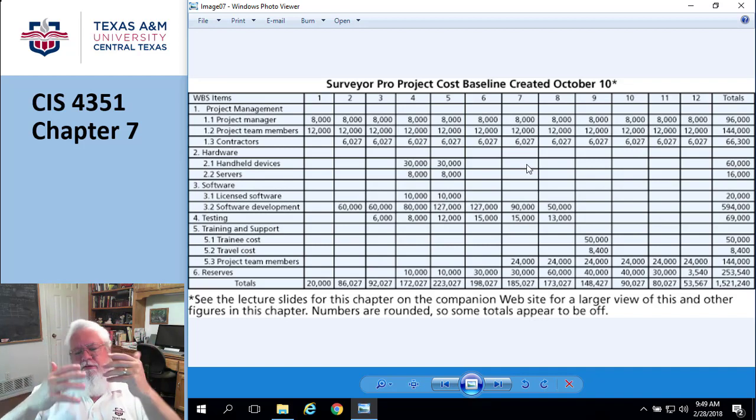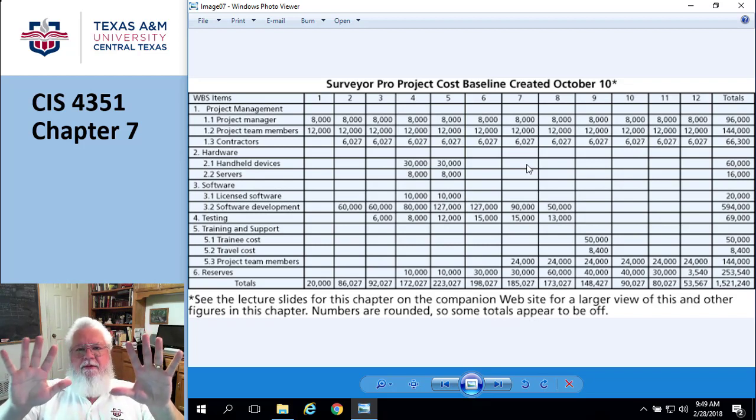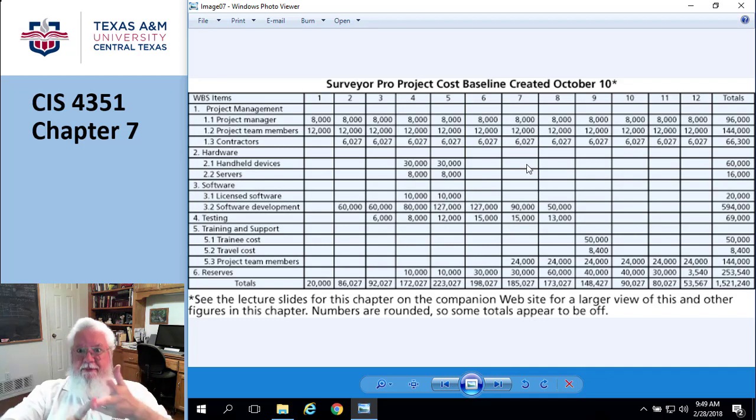You can't ever say, sure, I'll do it, without asking for more money or more time, because that will change their appetite. If you did that once, they'll have an insatiable appetite. Well, it didn't cost me anything last time. Okay, now I want this, and I want this, and I want this, and I want this. No, you're going to have to show them every single time that these things are going to affect both the time schedule and the cost.